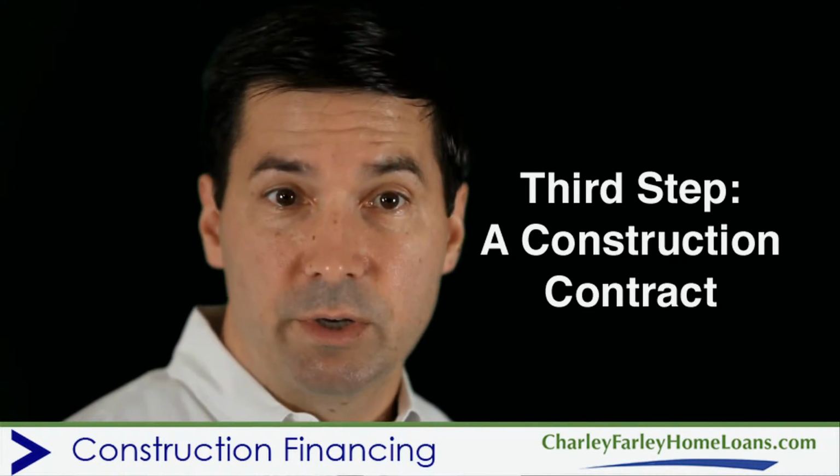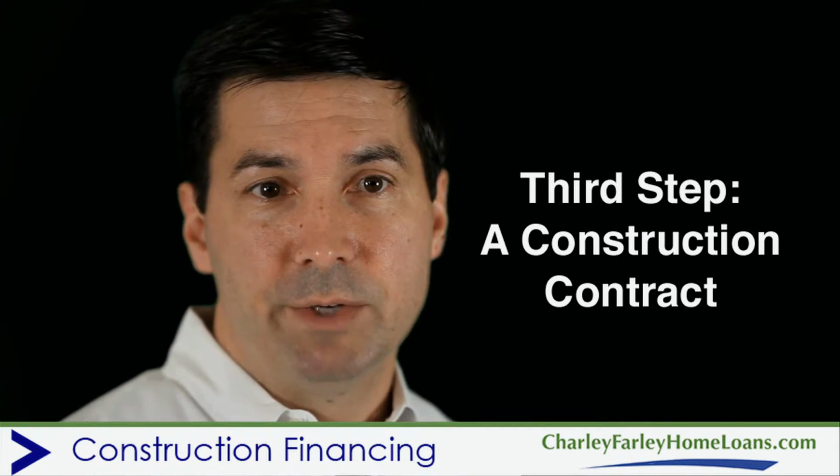While the appraisal is being generated, you'll be working on the third part of the process, putting together septic designs, builder's risk insurance, a construction contract with your builder or major subs, and a budget. All of your information will be provided to a construction management team for their review. Now, their job is to make sure that there are no disconnects like restrictive covenants or town ordinances that would prevent you from completing your project.